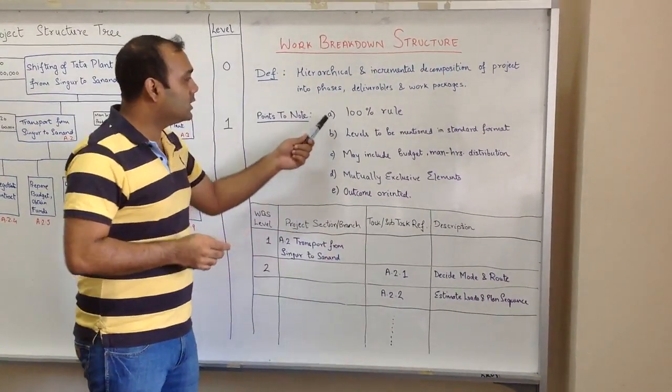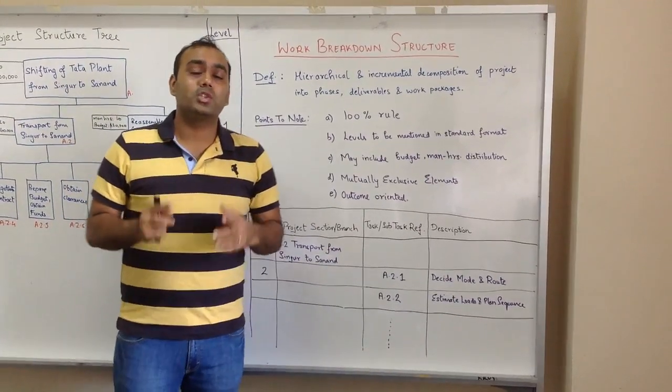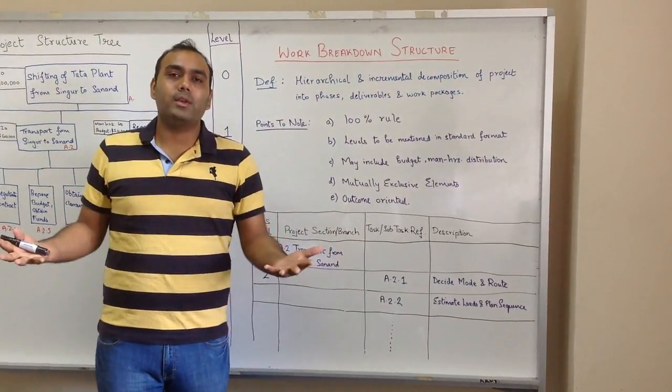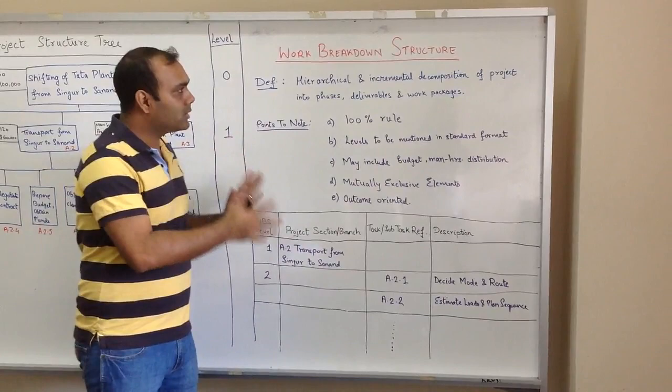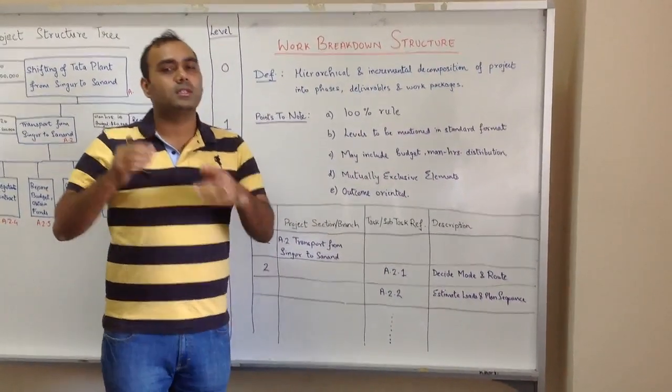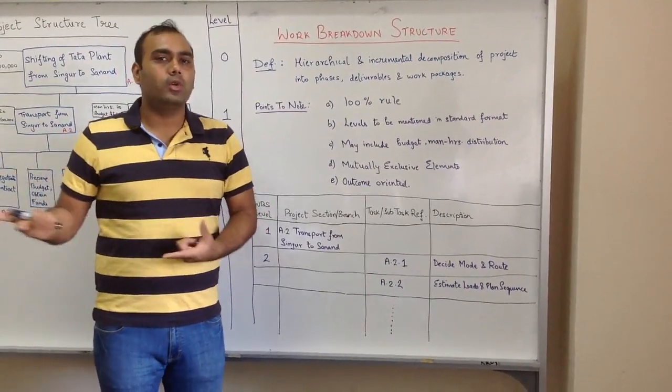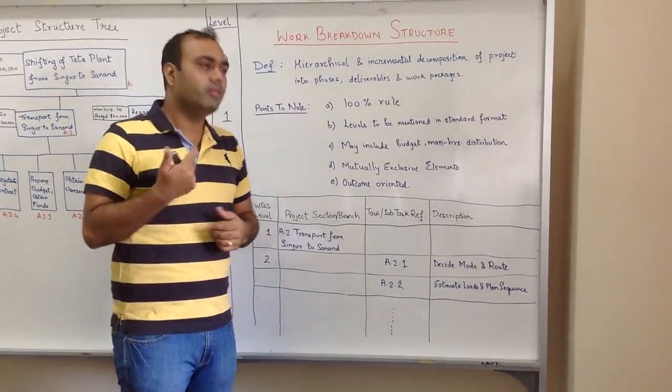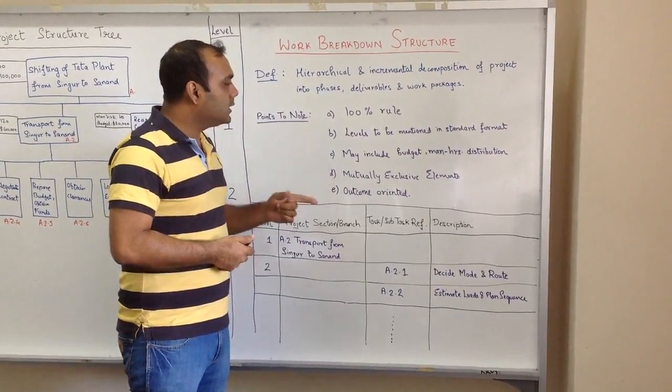There are certain points to note: First, the 100% rule - you should be able to cover all the work in the project within this WBS. Second, levels should be mentioned in standard format. There are certain standard formats on how you make a WBS. Third, it may include budget and manners distribution.